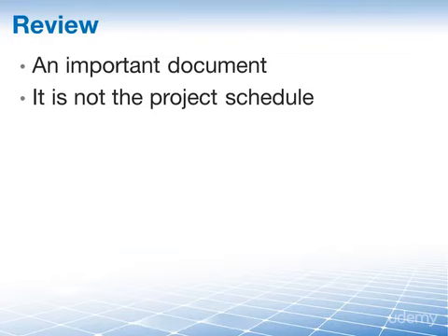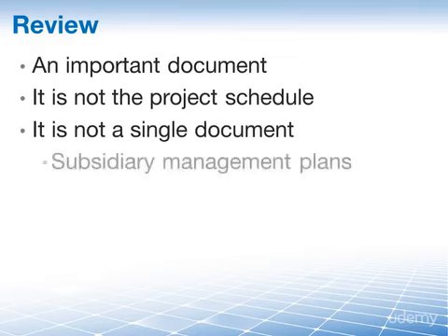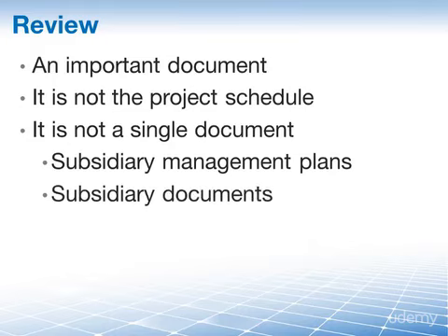The project management plan is an approved document that describes how a project is executed, and the schedule shows project activities on a timeline. The project management plan is not a single document. Instead, it is a collection of many other subsidiary management plans like the cost, risk, or schedule management plan. It also consists of other documents like the scope baseline, the schedule baseline, or the cost performance baseline.